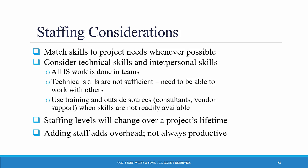It's well known in team-based project development efforts that the more people you add, the productivity per person falls. Studies have shown that when sub-teams exceed eight people, productivity falls. If you have a very large project, you should break it down into sub-teams. When two people are on a sub-team, they just talk to each other. When four people are on a sub-team, you have six lines of communication, so the communication structure becomes more complex with each person you add.